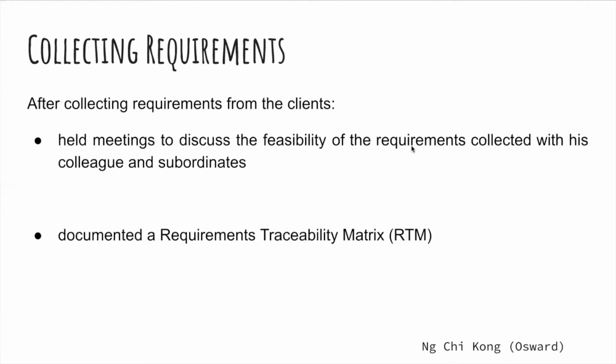After collecting requirements from the clients, Solomon held meetings to discuss the feasibility of the requirements collected by his colleagues and subordinates, and then documented the requirements traceability matrix. By doing so, the requirements were linked to their origin and traced throughout the project lifecycle from inception to deployment and validation. Approved requirements can also be facilitated after implementation.